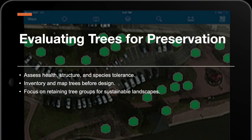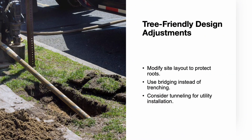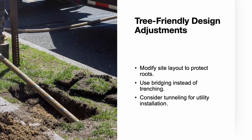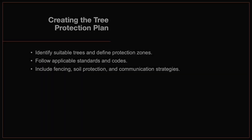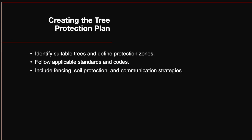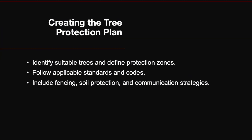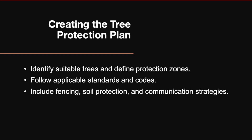Group retention is preferred. Clusters of trees provide better wind resistance and ecological value than isolated individuals. Sometimes even small design changes, like bridging over roots or tunneling for utility installation, can dramatically improve survival rates. Once preservation decisions are made, the arborist develops a tree protection plan. This could include fencing, soil protection, and clear communication to everyone on site. Compliance with local regulations is key.